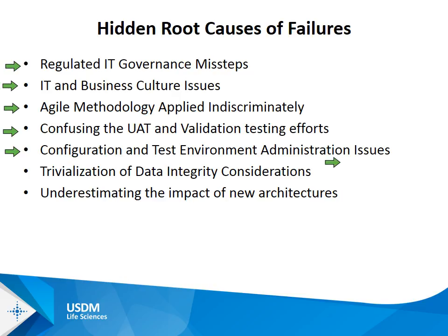Configuration and test environment administration issues. This goes back to the technical side, where we often see people have not thought through their environments and how they're going to be managed and how many they should have. And that will vary depending on your scenario. Are you migrating from a legacy system? Are you starting fresh with a green field? How many systems are you integrating with? How complex is the testing environment? How many global regions are you dealing with? How many instances? So this is something that's often overlooked.